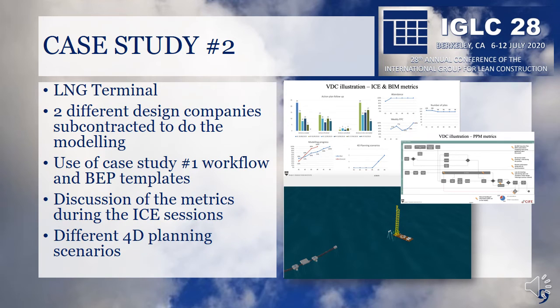Now turning to case study number 2, this was the bid of a LNG terminal in which 2 different design companies did the BIM modeling. We have used the workflows and templates created for the previous case study as a basis to the approaches here. Improvements were made and we also got much more detailed workflows for the design steps. The metrics were assessed and discussed during the ICE sessions, and they helped us see where the problems were and therefore elaborate action plans to solve them. We have also conceived different planning scenarios to this bid.